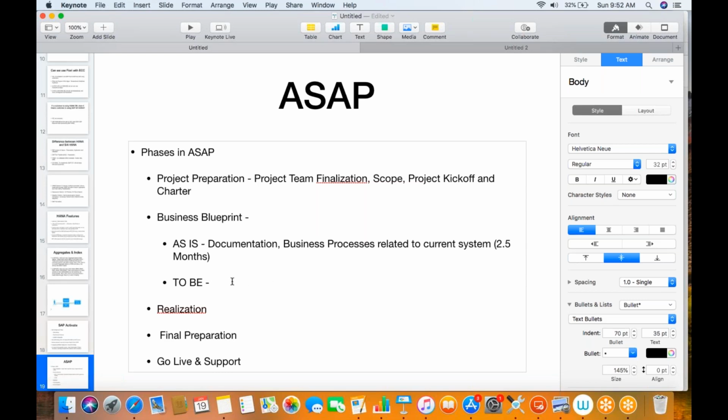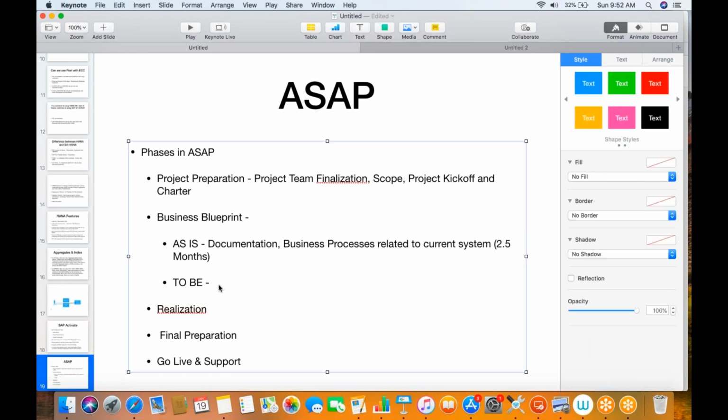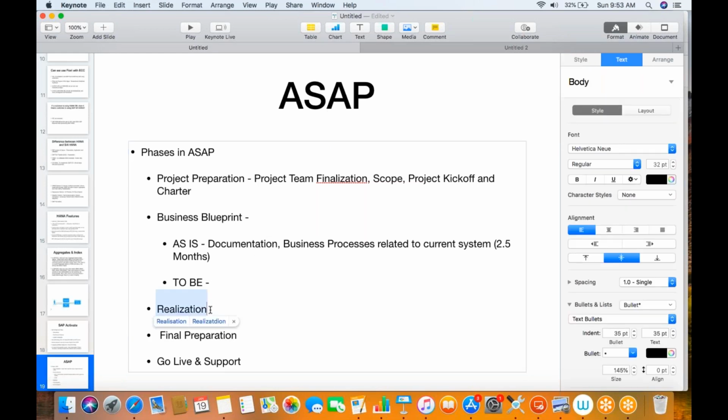Because at this level, nowhere in SAP Activate methodology it is written that you show the system to the client. So if you are following the methodology, there is no system in place before realization, right? So all these discussions are non-productive. Without the system, all these discussions are theoretical discussions which are not adding any value, because the customer is not able to get the real look and feel of the system.